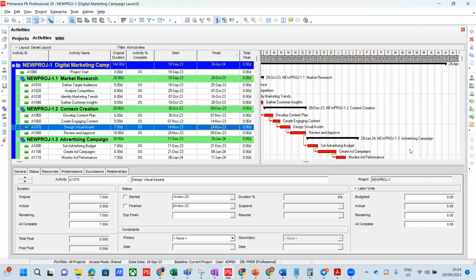But that means the beans did not finish before you start cooking the rice, right? And you can't put that relationship as finish to start. It's going to be start to start with an allowance of 30 minutes, which is called lag.